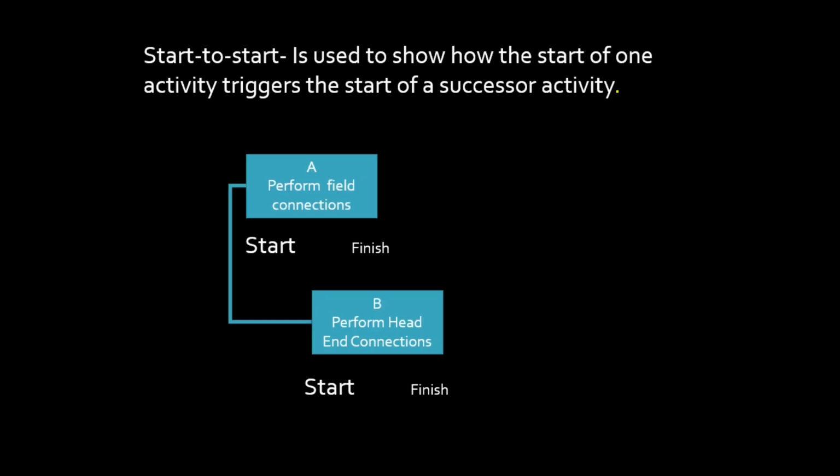It's also in case A can't start when it needs to. I don't want B to get started ahead of time just because it was scheduled to start. Do you understand what I'm saying? If A was to get delayed and I'd scheduled B to start on a particular day, I didn't take into account that A needed to be done first, or at least get started first. Think like a project manager. This is the third of the dependencies, and this is SS on a network diagram, start to start.